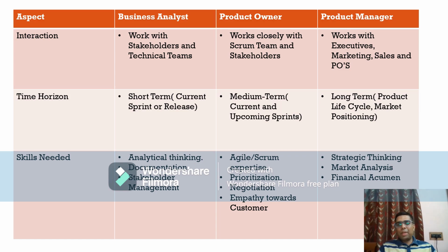So ideally, the role of a business analyst is to start with requirement gathering, and once the requirements are finalized, we draft the solution, and after that we create the epics. After that we create the user stories, then we refine them. After this, the stories are assigned in different sprint ceremonies or scrum ceremonies, basically in the sprint planning session. And we also need to work with the developers to help them as much as possible, so that we can deliver within the given timeline.